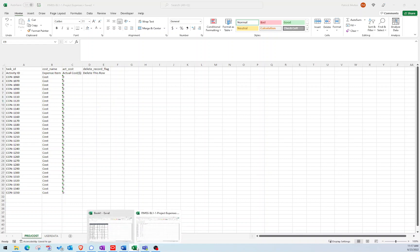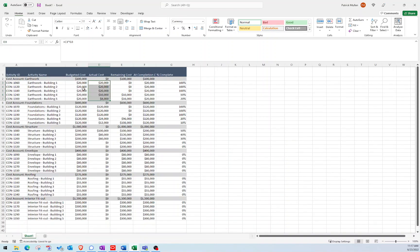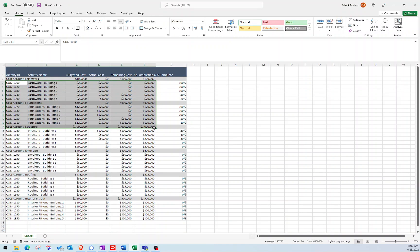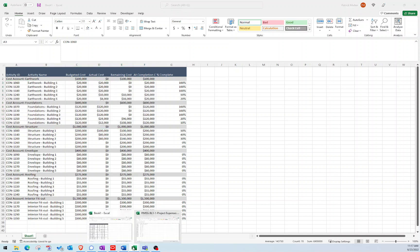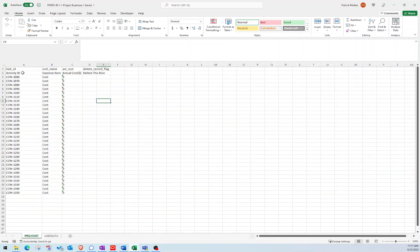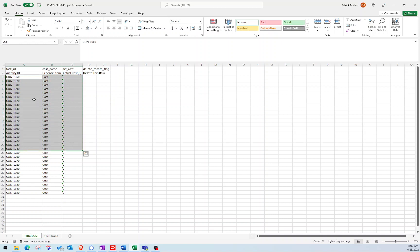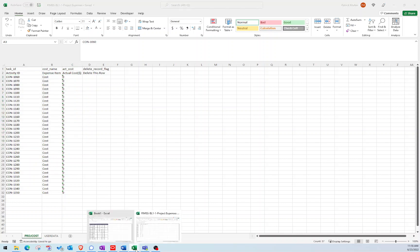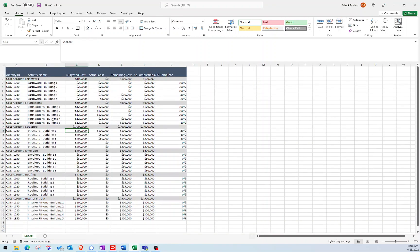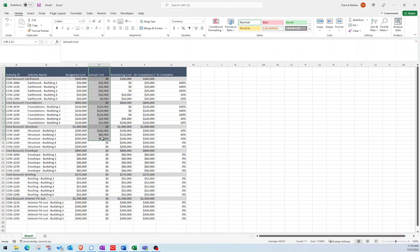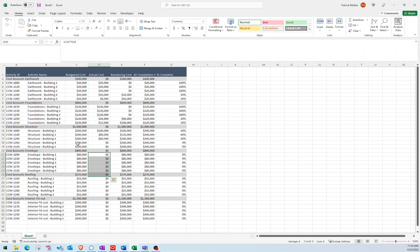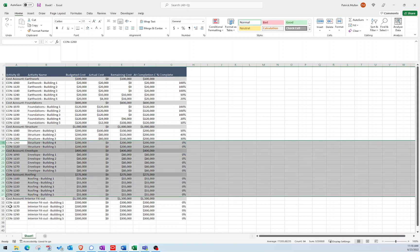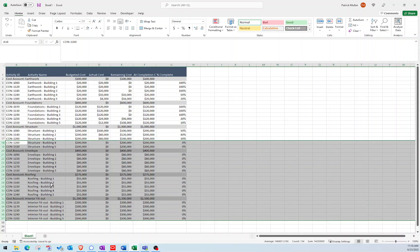What I need to do is I want to take this information and format it in a way that is going to look like this and put it under the right columns. And then that way I can bring that back into P6. But I have to format it to get it in a format that's importable for P6 to know what values are in each cell. So by doing that, I'm going to take anything that has an actual cost in it, because those are the items that I want to import. I can ignore the rest, anything with a $0 actual cost value. I don't need those. So I'll delete those values.